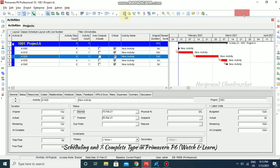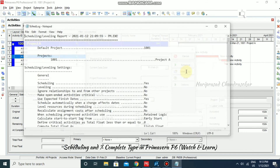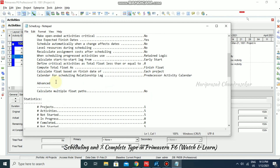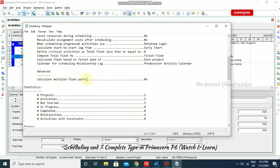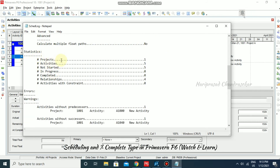Now I'm going to schedule it and view the log. Clicking view log opens a notepad showing our project details — default project, scheduling yes, leveling no since we didn't level anything, calculate multiple float pass no since we didn't choose that in advanced options. Statistics show project 1, activities 5, not started 5, in progress 0, and we have 4 relationships.